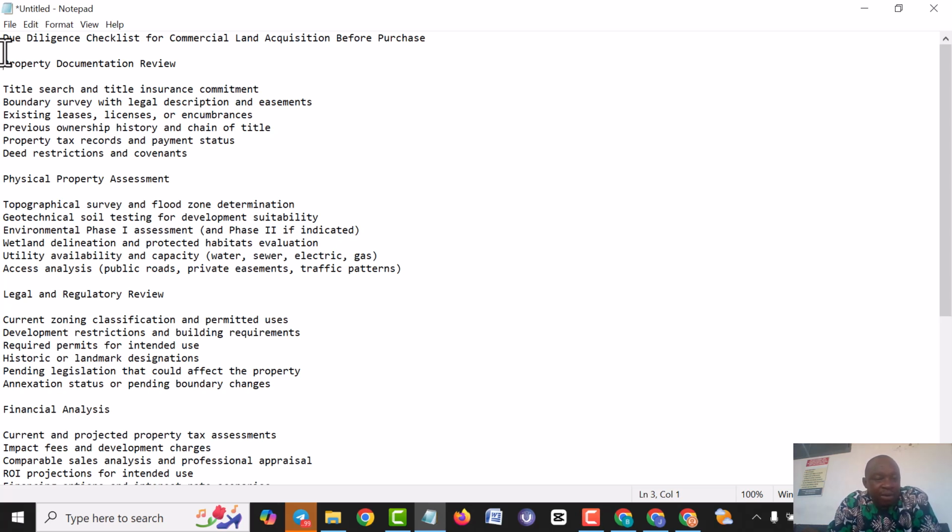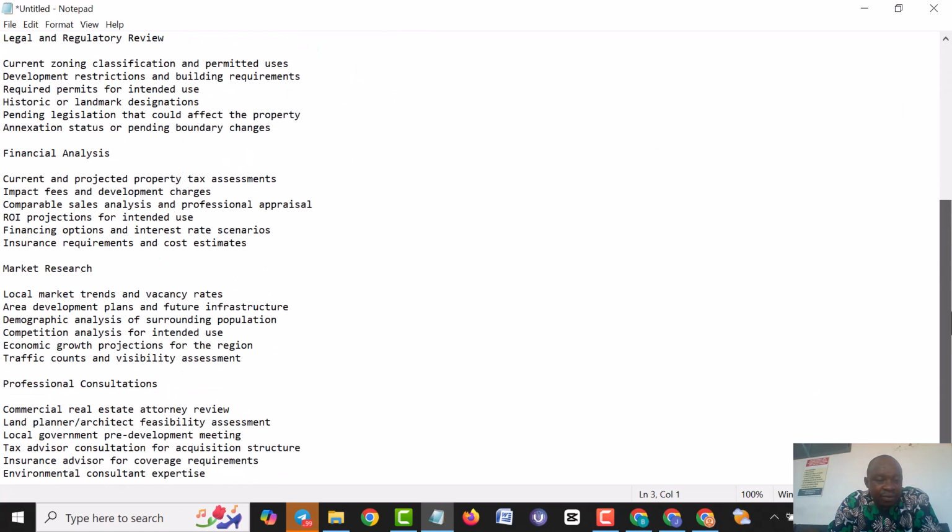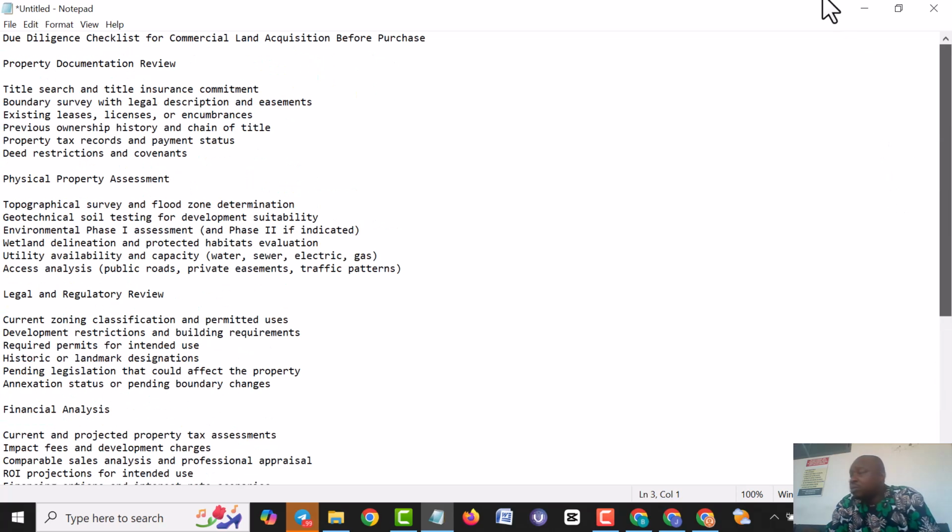Number one, we have property documentation review. We have physical property assessment. We have legal and regulatory review, financial analysis, market research, and professional consultation. Those are the five things we have under the due diligence checklist for commercial land acquisition before purchase.